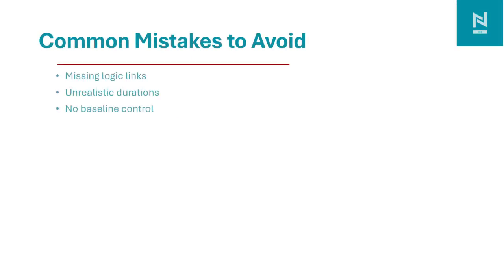Common mistakes to avoid while developing the schedule: missing logic links will not provide the critical path in the program. Unrealistic durations, durations with which the team cannot complete the activities; we should not provide unrealistic durations. And another is having no baseline control.